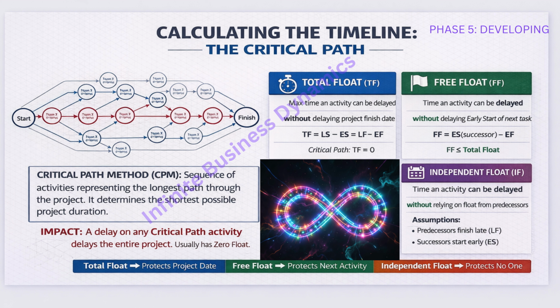Okay, imagine a relay race. But also, imagine someone else is running a separate, shorter race next to you. You can't leave the stadium until everyone is done running. Path A takes 10 minutes, Path B takes 20 minutes. It doesn't matter how fast Path A runs. The group is stuck there for 20 minutes. Path B is the critical path. The project cannot finish until that longest chain of events is complete.